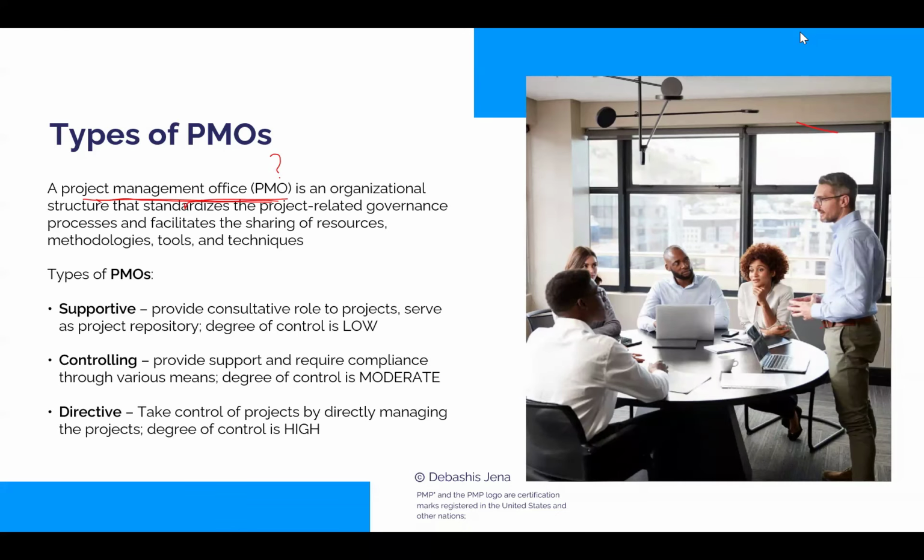Generally, these would fall on the plate of the project manager. However, there is a point. I don't deny it outright. In large projects, there may be a PMO that assists the project manager in maintaining the issue and risk register and compiling reports. That could be a possibility. But the responsibility of managing issues and risk in the project should stay with the project manager.